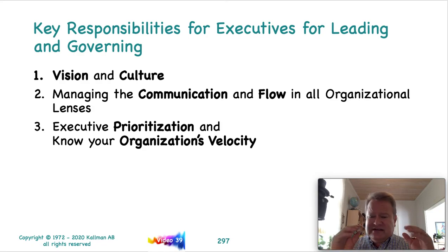You've got to do it that way, because if you're not prioritizing and you're doing what they did at the one organization that I showed up to, where they had 260 projects in the list and they could only do 58 a year, you're going to demoralize your teams. Just throwing mud at the wall to see what sticks isn't a very good way of doing business. In fact, you probably only had less than a 25% chance of getting the right thing done at the right time for your organization.